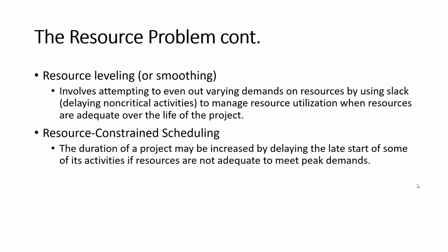We do not have enough resources to meet those peak demands. So if the resources are not adequate to meet our peak demand, we can delay the late start of some of these activities if we are having a resource constraint.